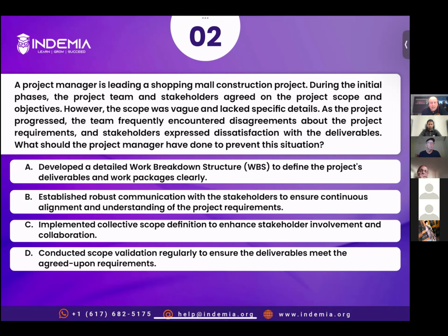Consider rolling wave planning to deliver the project in multiple releases. Now, what is rolling wave planning? Rolling wave planning is a type of planning where you divide your project in chunks and you focus on near-term work. So when you lack sufficient detail about project specifications, you focus on near-term work and you progressively elaborate your plan.